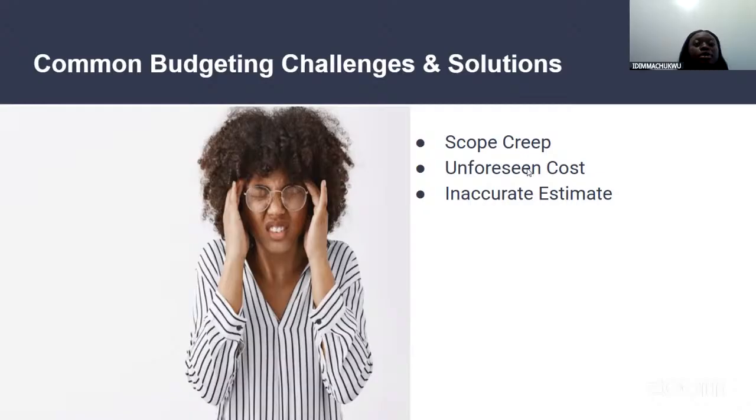And then during the execution phase of the project, the government puts in another levy to say you have to pay this certain amount of money. Now, this is an unforeseen cost because you have to pay it, and you don't have a choice, because if you don't, they might stop you from actually carrying out your project. So you need to pay. So this type of cost is known as unforeseen cost because it was not identified during the planning stage of the project.